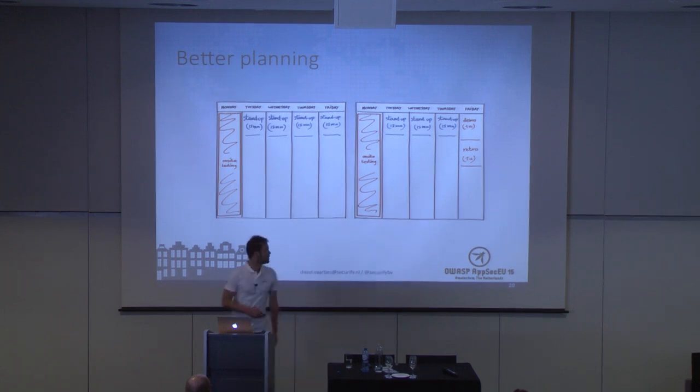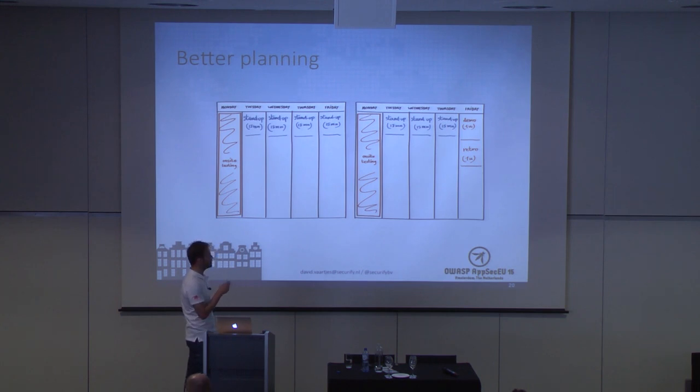We had some problems, though, because if you are closing your sprint here, then the first opportunity to look at everything they built here is here, which is too late. So we had to shift some of the days to the end of their sprints. But this was working pretty well.